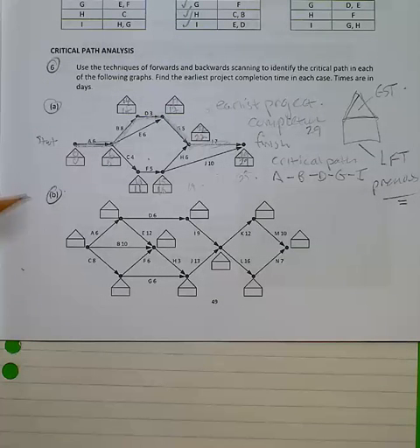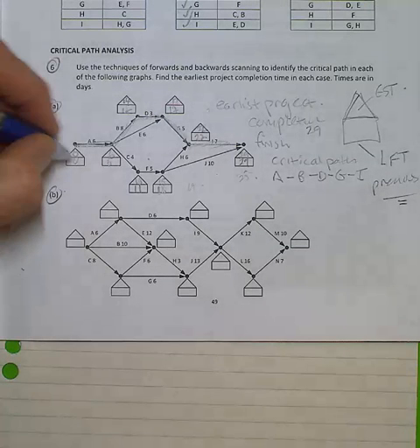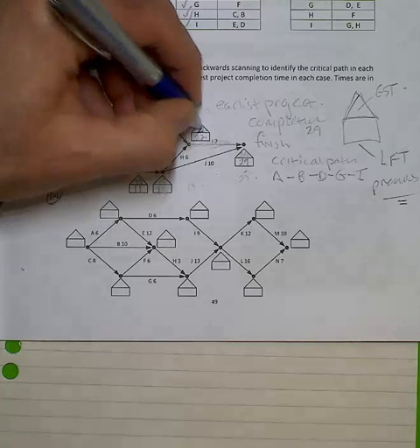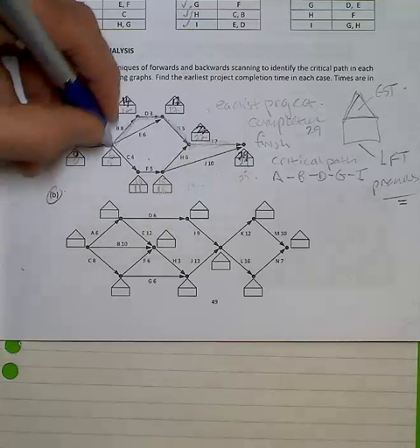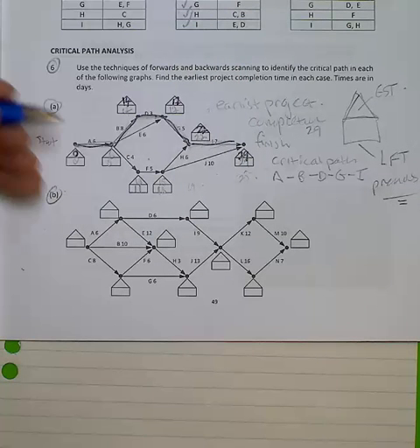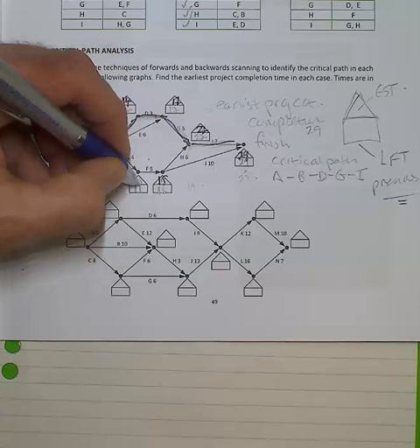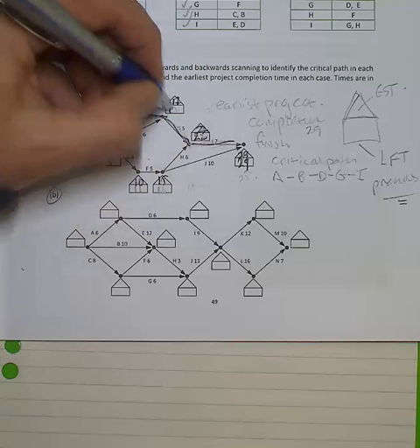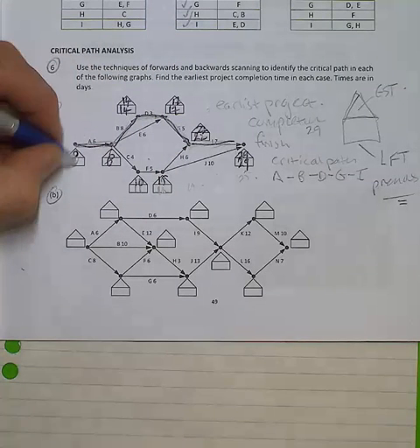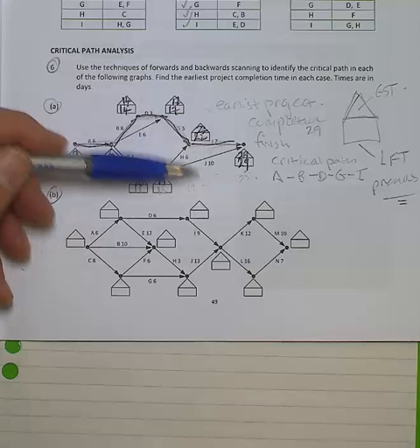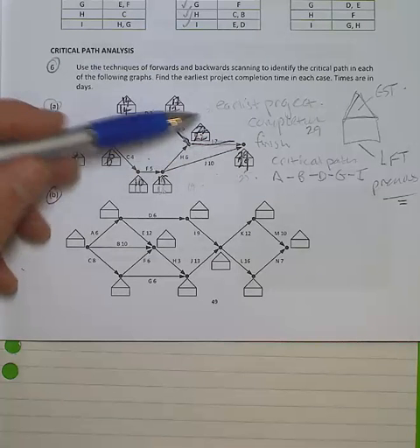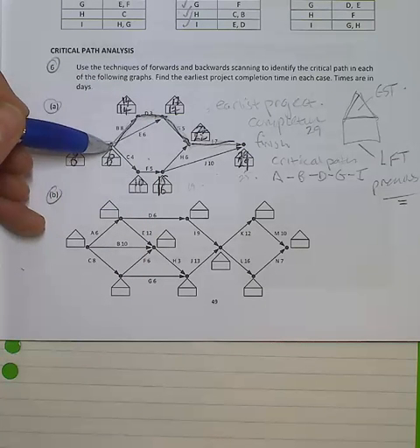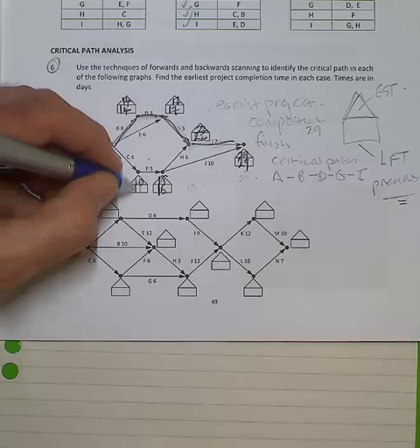Now this takes a fair bit of thought and a fair bit of reasoning to work out as you go. I'll just draw these in pen so they stand out a little bit more. So the critical path, the longest time. You can see the branch here. Next step, I fill in the other things. 29, 22, 17, 14, 6 and 0. The choice at the junction, I must go the smaller of those options, which is 22 take 6, which is 16. There's only one choice for the latest finishing time of activity C, which is 16 take 5, 11.